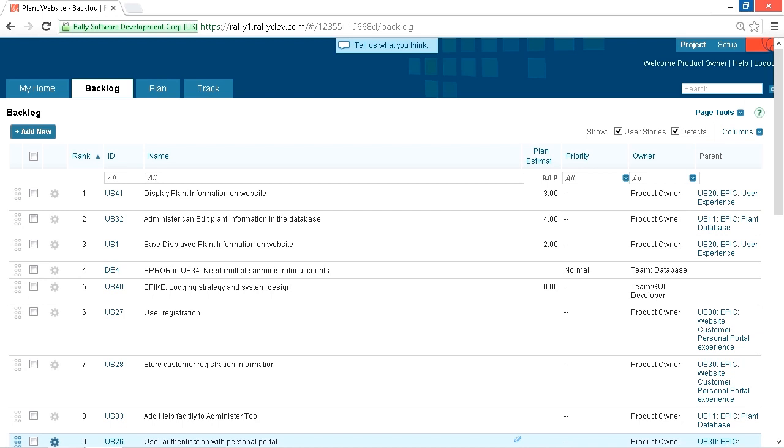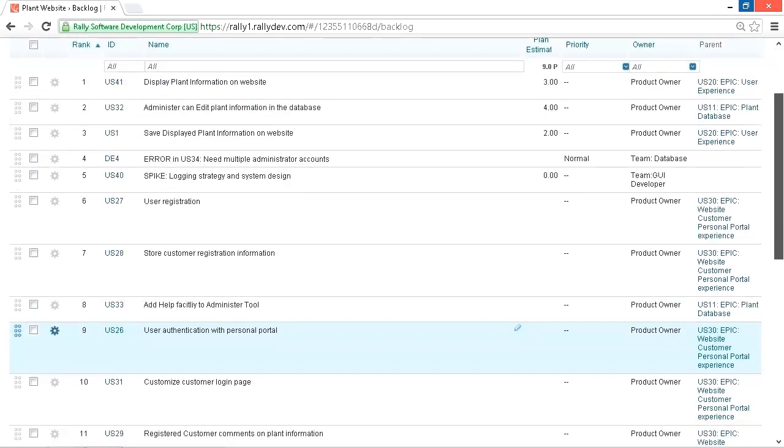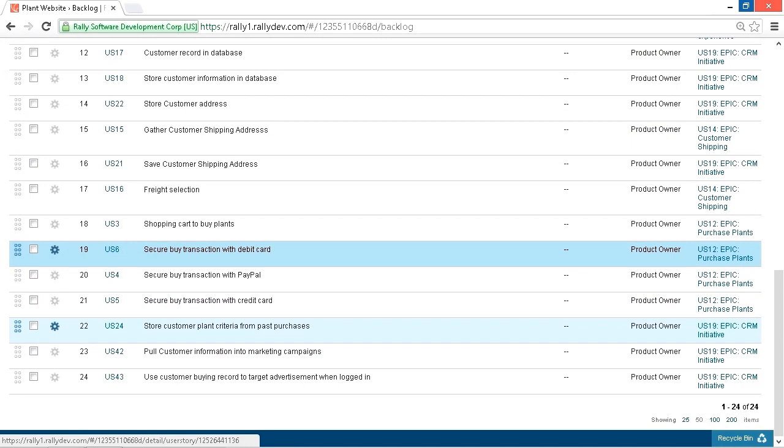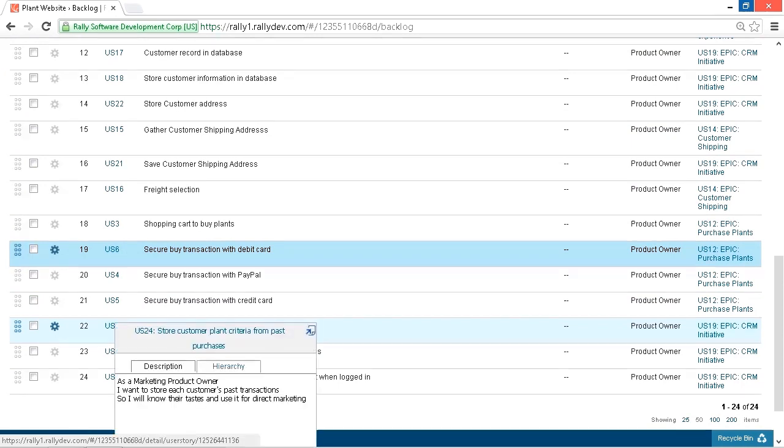Most are in the form of user stories. Each should describe what the customer wants and why it is valuable. The PBI should not describe how the team will develop the feature, and each PBI should describe something that is of value to the stakeholder. Now, when they're first added to the product backlog, these PBIs are normally broad descriptions of large epic areas.